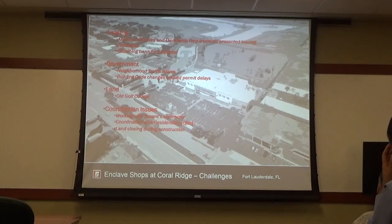When you do the soil test, do you hire a soil engineer or a geotechnical engineer? Yes, we work with a firm. They will do geotechnical testing and environmental testing. If there's an existing building, we'll do asbestos testing. Did you actually have to do a Phase 1 or had it already been done? One had already been done. Right, but then you still back checked it?